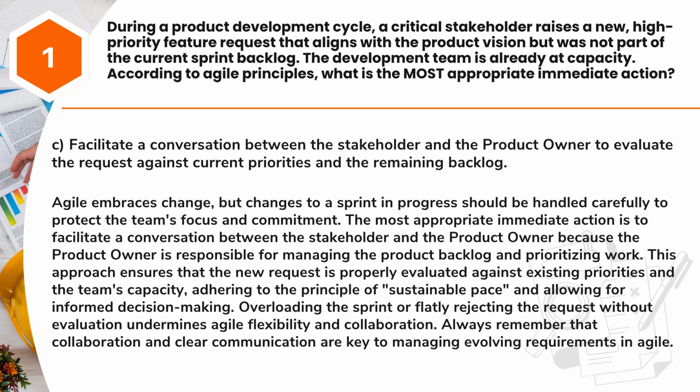Answer: C. Facilitate a conversation between the stakeholder and the product owner to evaluate the request against current priorities and the remaining backlog. Agile embraces change, but changes to a sprint in progress should be handled carefully to protect the team's focus and commitment. The most appropriate immediate action is to facilitate a conversation between the stakeholder and the product owner because the product owner is responsible for managing the product backlog and prioritizing work.